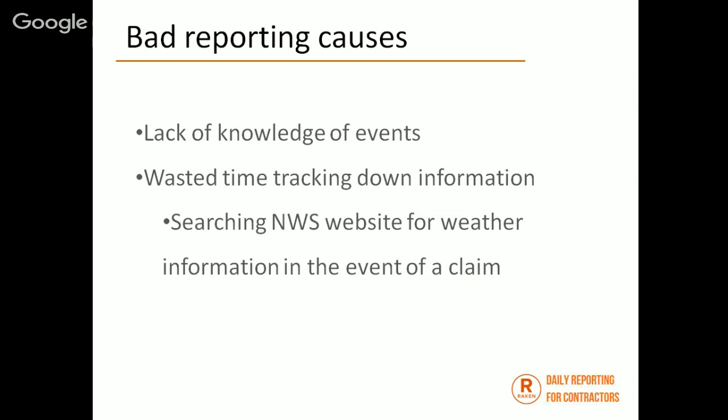I had another instance where we had an owner that was working with us on some delay stuff, and we needed to verify some weather and that it at least affected our job site for 2 hours or more. Well, our superintendent did not do a good job at recording that generic information. So we had to spend probably a day or two going back, because the project was well over a year into it. We had to go back to every single day, look at every single report to see what we were doing that day, to see if the weather, when it rained, affected us. So it was a lot of time. And we all know wasted time is money, right? So we don't want to waste time.